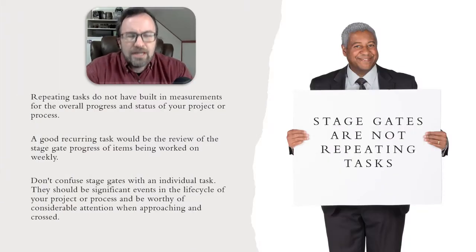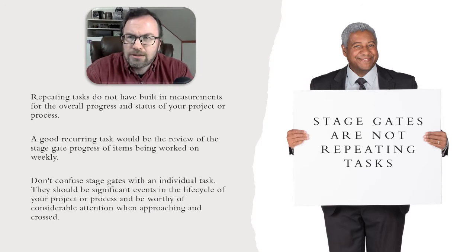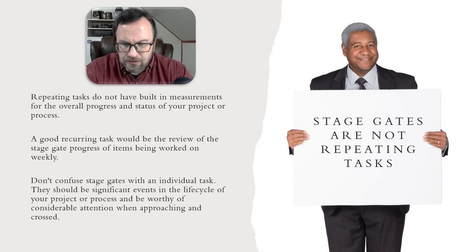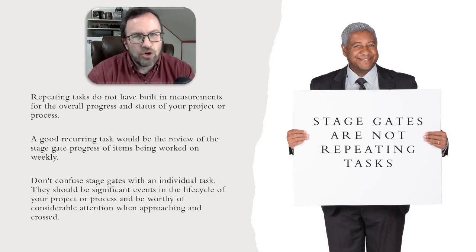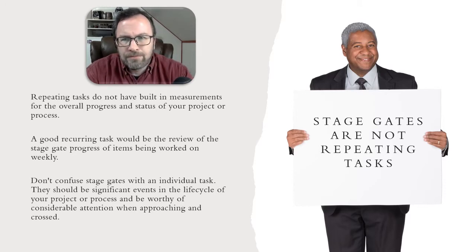Now, one of the other things that I hear a lot is, oh, stage gates, well, I can do this easy. I can just create repeating tasks in my project, and every time this task comes around, I'll do my evaluation. But that's not what a stage gate is either. Repeating tasks are actually much closer to the hurdles we talked about a minute ago. See, repeating tasks in and of themselves aren't telling me anything. The task may tell me to do an evaluation or to do an analysis, and that's great. But it's that analysis or that evaluation that's going to give me that information. That's what makes a stage gate.